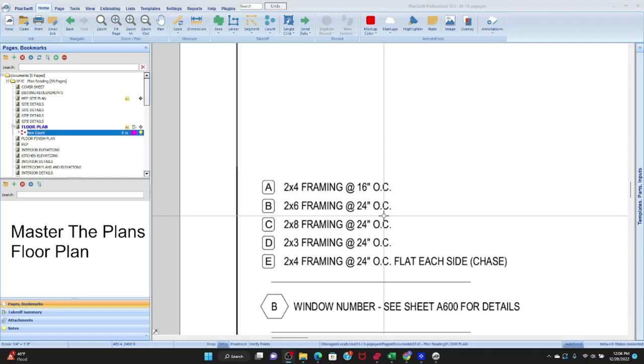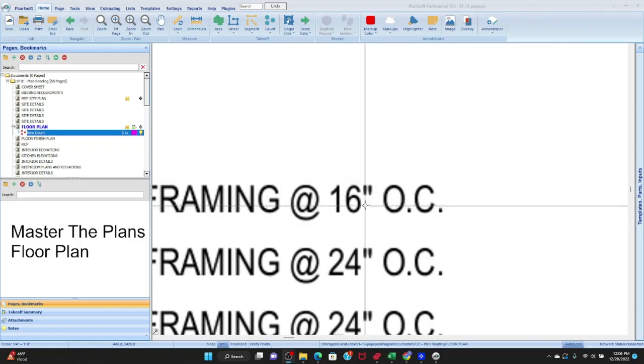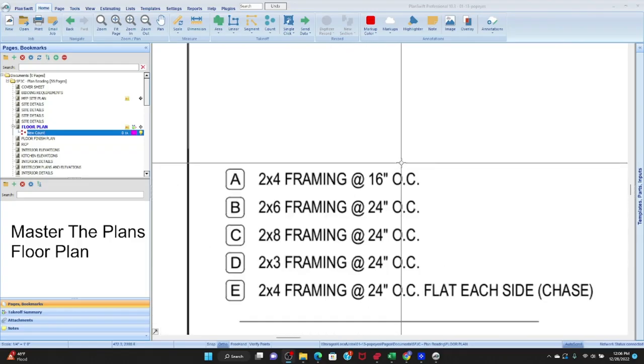Because in most cases, this doesn't have to be for studs. It could be for screws. It could be for nails. It could be for bracing. It could be for rebar, right? So we always have to be ready to do that calculation. And in most cases for construction, we're always going to place something at inches. Okay, so we have to be ready to change those feet into inches, and then we multiply by whatever the placement is. And I say the placement, the number they say, 16, 24, that's the placement.